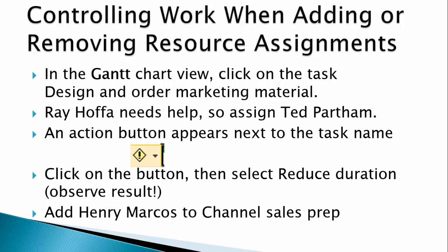Given that we want to honor the estimates and our goal is to add a resource to lighten the workload, go ahead and select the choice that reduces the duration and note that Project complies. Once you've done that, go ahead and add Henry Marcos to the channel sales prep task.